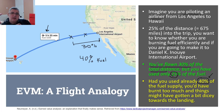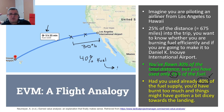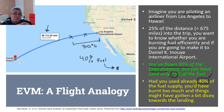The analogy for project management: the distance is the work you need to execute, and the fuel is the money — the budget of the project. Every time you start a project you have an amount of work to do and a cost. It's not just about checking if you're doing work on time; you have to check if you're spending money at a pace that allows you to finish the project. Earned Value Management helps us understand both of these things.